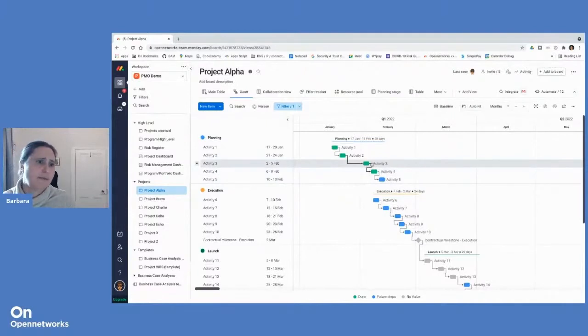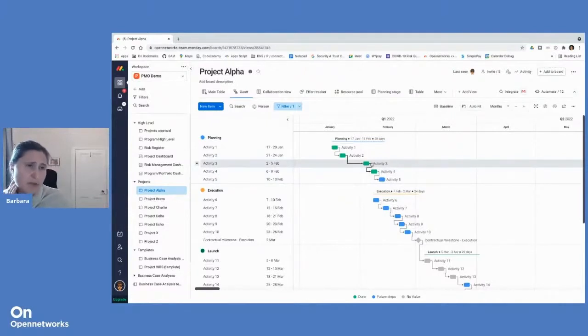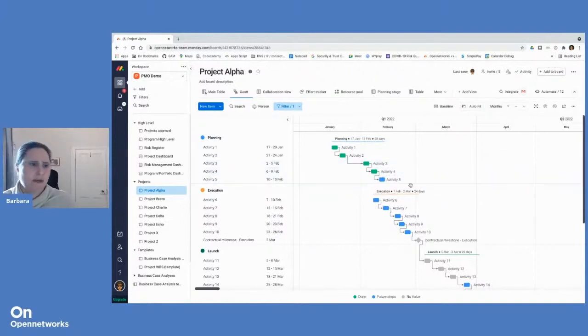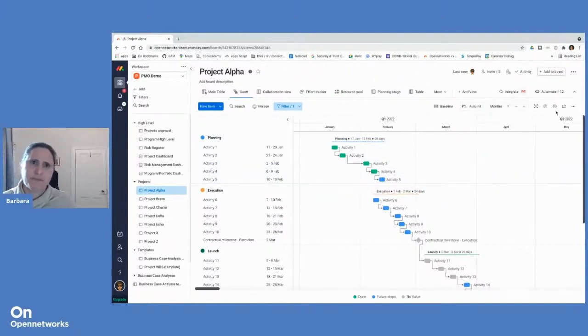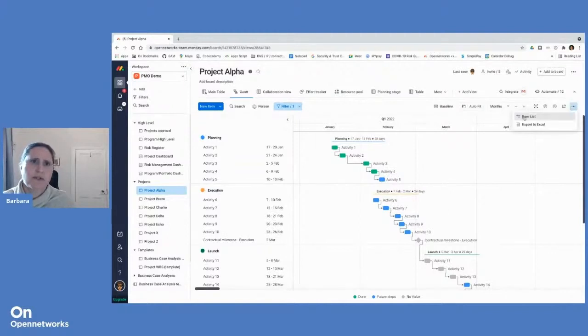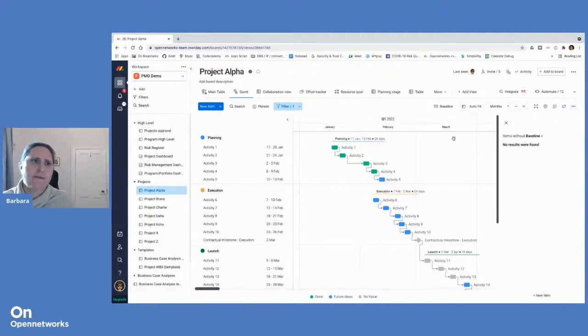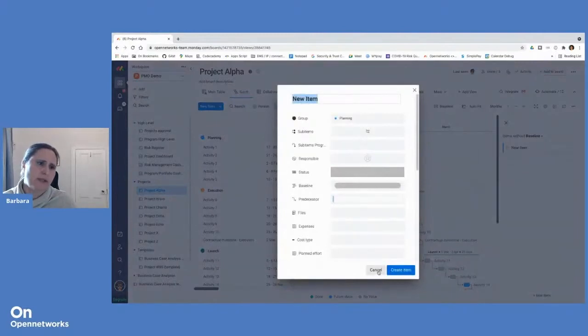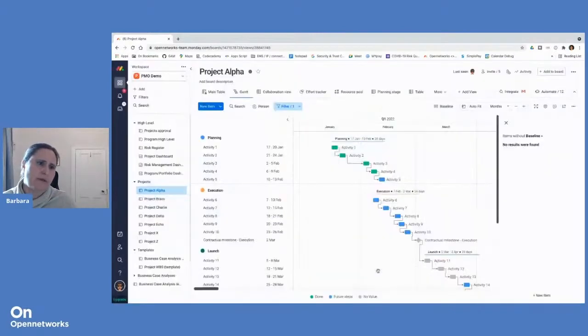So Activity 3, or Task 3, was postponed because someone was ill perhaps. Then it will move all the other activities along as well. I can also from this view go and create a new item and add it to the table.